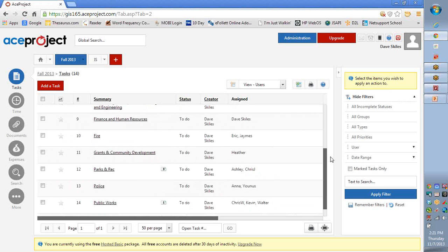And then on the third day, when the PM is back in the office, everybody gets together for an hour to make sure that we've got all the relevant points together and do our couple of slides for the presentation. So in total, just for labor, we're looking at about 39 hours and $2,375.